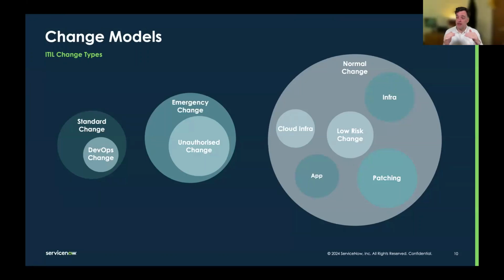So when you're looking at your business stakeholders, they're talking about release, your big compliance activities. Has it been signed off by the business? Has it been signed off by legal? Have we done an operational handover? Do we know what service is taking this on? Has the handover to them happened? Are we ready to go? Go, no go? Can we go? Is everything in place to go? Let's go, right? Those kind of activities are your release pipeline, and they're release activities, and they're not change activities.